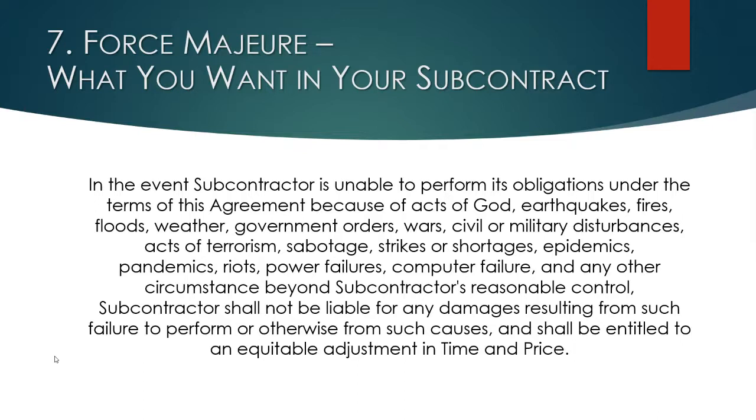So we're trying to head off those issues that we saw last year in as many specific ways as we can, but then we conclude the language with the broad catch-all of any other circumstance beyond subcontractors' reasonable control. And that gives you an argument that something not listed here should get put on the list. Should be a basis for you to use the force majeure clause in your favor.